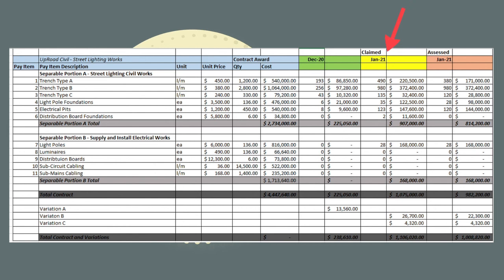Their total claim comes out at $1,106,020. Under the orange heading, we have our assessment of this claim. As the head contractor, we need to assess this claim for what we believe it is worth. While Uprod Civil are claiming for 490 metres of trench type A, we believe they have only completed 380 metres. Similarly, they are claiming for two distribution board foundations and we believe they haven't completed any — most likely because although they have substantially completed the works, there are outstanding defects or works to finish before we can pay them. We've also assessed the valuation of their variations differently. In summary, our assessment of their payment claim comes out as $1,008,820.